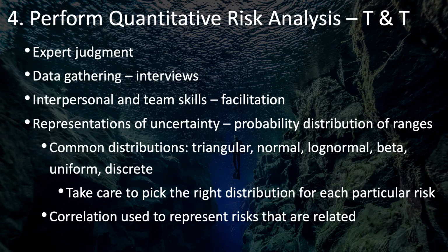For tools and techniques, in addition to your standard expert judgment, data gathering, and interpersonal and team skills, you'll need to consider how to represent uncertainty using different probability distributions. You'll need to make sure you pick the right distribution for each risk. And you'll need to identify and represent the proper correlations between different risks that are related.